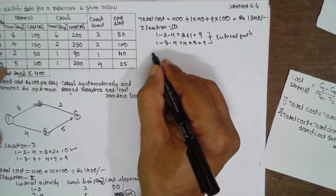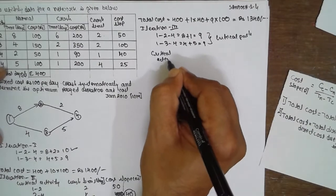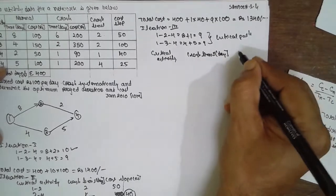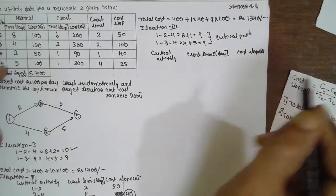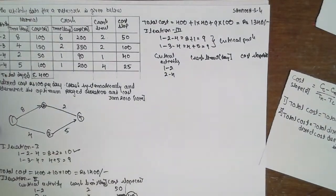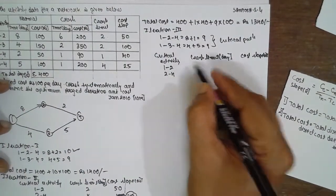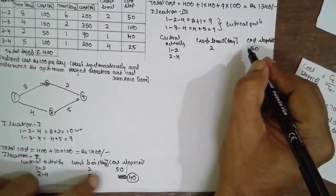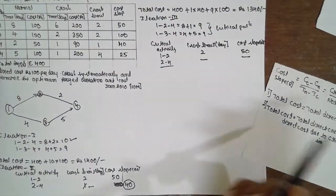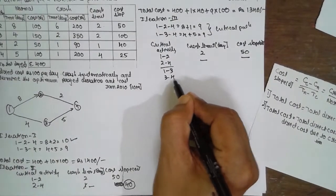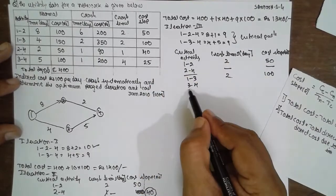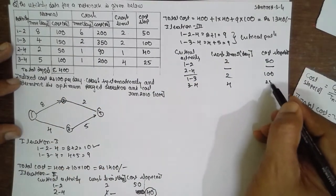Now we are going for crushing the activity. Because there are two critical paths, for path 1-2-4: activity 1-2 has crash limit 2 and slope 50; activity 2-4 is already crashed. For path 1-3-4: activity 1-3 has crash limit 2 and slope 100; activity 3-4 has crash limit 4 and slope 25. Select the smallest slope from each critical path: 50 from path 1-2-4, and 25 from path 1-3-4.